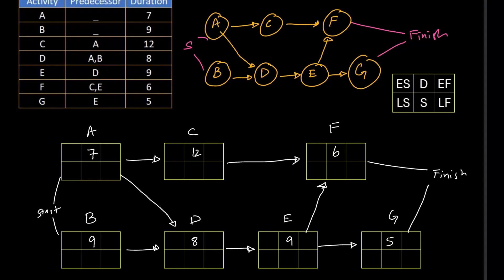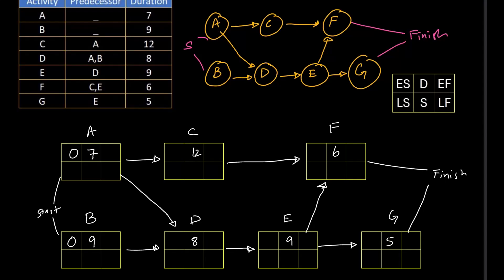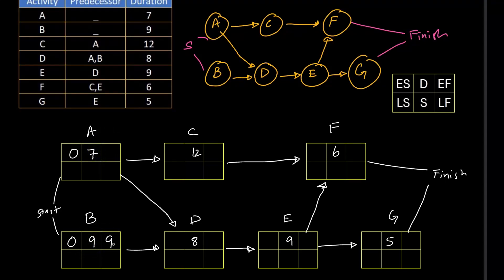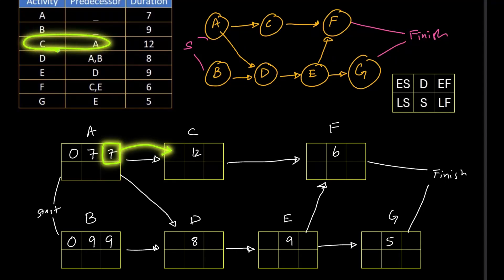Now we need to write early finish and early start. Since A does not have any predecessor and B also does not start after any activity, the ES box for both can be labeled as 0. Duration of A is 7, so the early finish for A is 7. Similarly, early finish for B is 9. This 7 carries to C since C starts after the completion of A.